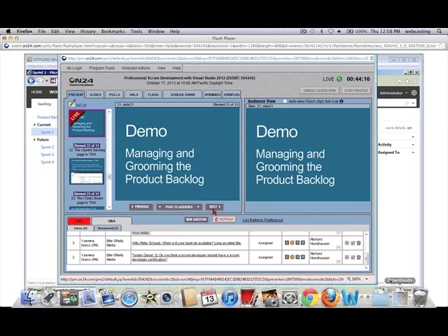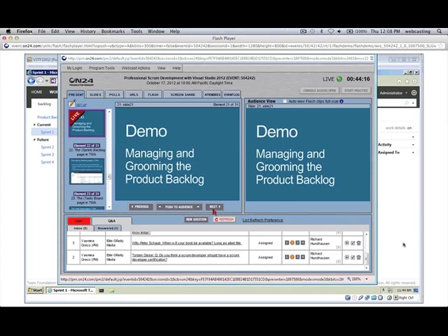The bad news is if you want to use this really slick new task board in Team Web Access, the way it is right now, you can only drag task work items across the different states. And I'll demonstrate this here in just a minute. But it does allow you to quickly see items, and these are tasks, and they're estimated in hours, what's to be done, what's in progress, and what has been finished or done. And those are the only 3 states that the Scrum template uses.